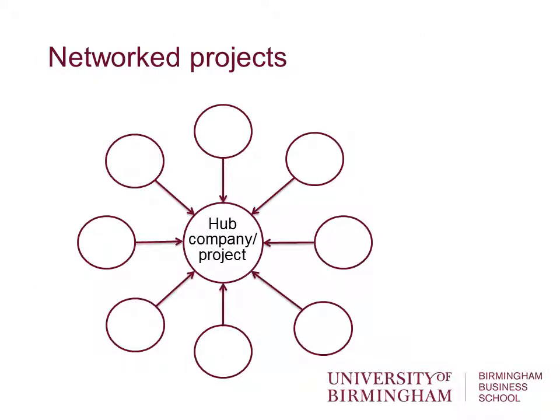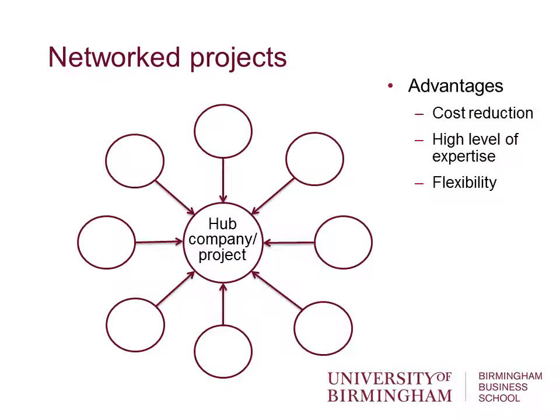Okay, and the final one I'm going to talk about briefly are network projects. This is often used for product development, where you have some sort of hub company, a company which wants to deliver something, and it brings in skills and resources from lots of other organisations who may themselves have a stake in delivery of the project. The advantages of this: cost reduction. The cost is spread throughout organisations, and each organisation can bring some skills to the project. There's a high level of expertise in these kind of projects, and flexibility.